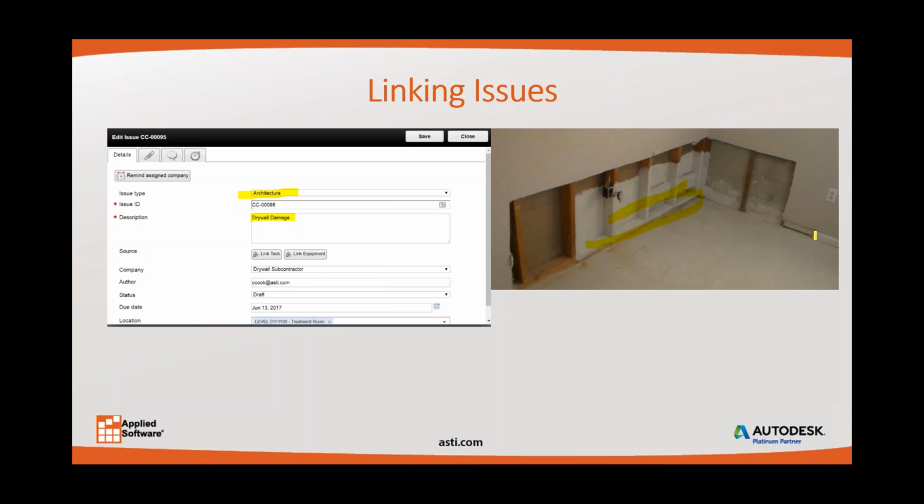We'll also have to get the millwork subcontractor to come in and trim out this corner, and then ultimately we're going to have to do the electrical trim work here to get this outlet reinstalled, faceplate back on it to finalize this work. So those are all linked tasks that need to be completed in some sequential order, and we've gotten one step further with this release to getting closer to that kind of linked order of issues, right?